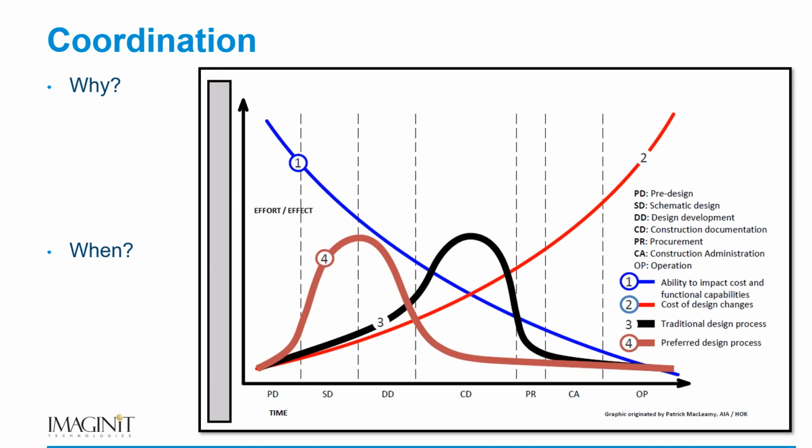That cost line that arches up in number 2 in the red, that's where that effort and that cost starts to grow. But if you have a modeled environment that you've simulated that layout, and you understand that, hey, I have the optimal design for the maximum production in my facility, and then my building is fully coordinated to fit around my factory lines, well, you can simulate and you can execute those changes earlier on in the design process such that it is less impactful.